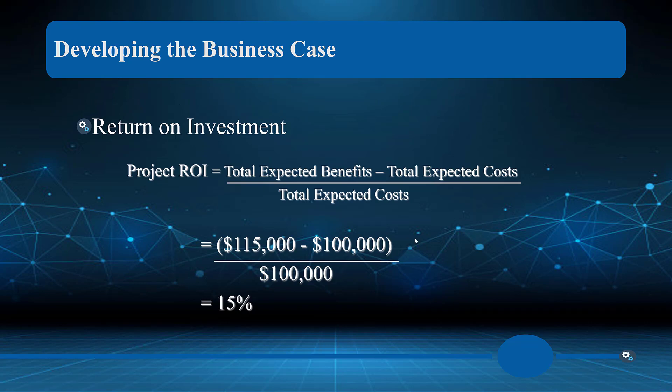When we talk about overtime, let's not forget burnout. Some employees need to work their 40 hours a week — they have family and other obligations. That brings us to return on investment. The standard ROI calculation is: total expected benefits minus total expected costs, divided by total expected costs, which gives us a percentage.